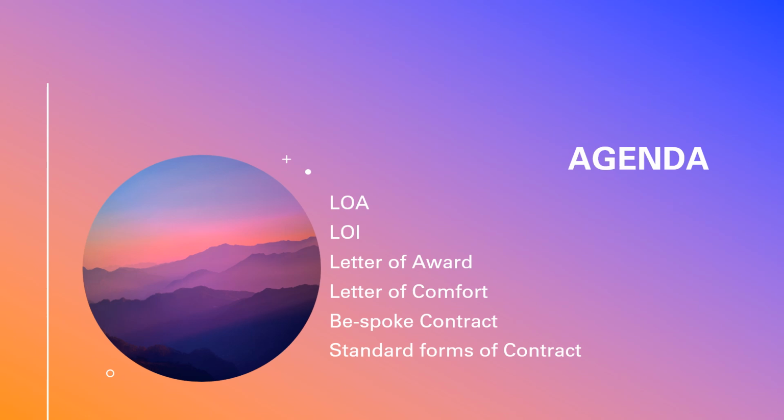Okay. Letter of acceptance, LOI. What is this letter of award? Letter of award is basically a standalone document. It's not referred to any other document. In the previous case, when I explained LOA, I mentioned this LOA is based on the tender issued on this date, PTC issued on this date, tender addendum issued on this date, all references will be mentioned. But in this letter of award there is no reference.